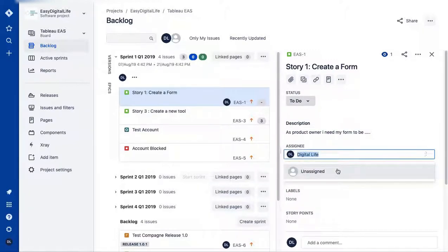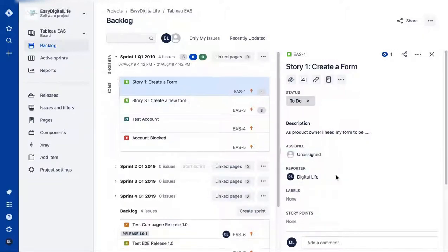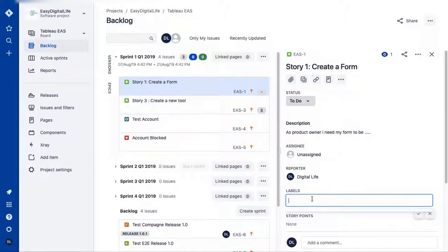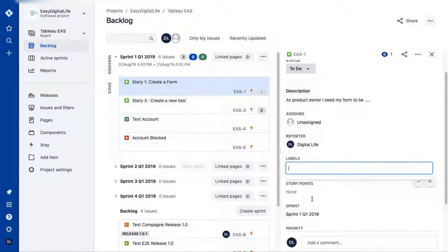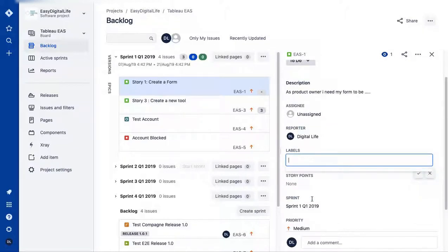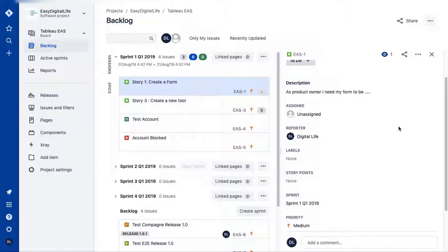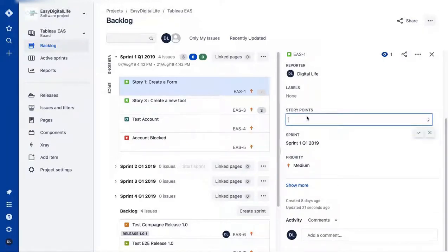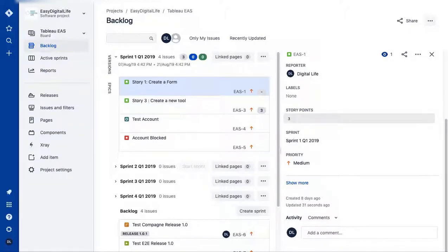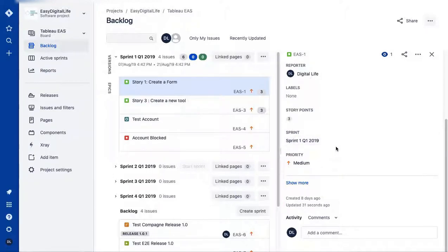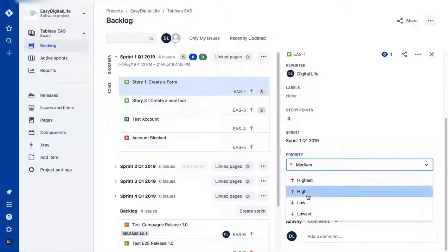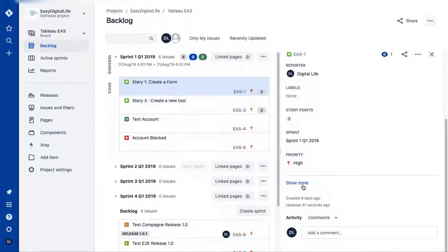Save it and assign it to one of your team members or the person developing that functionality. You can add a label — it's really important if you want to use the reports section, as it filters very well. Story points are important to add during sprint planning so you have the capacity of your team — for example, this one will be three points. The sprint is Sprint 1 Q1, and priority is Medium, which you can change to High.